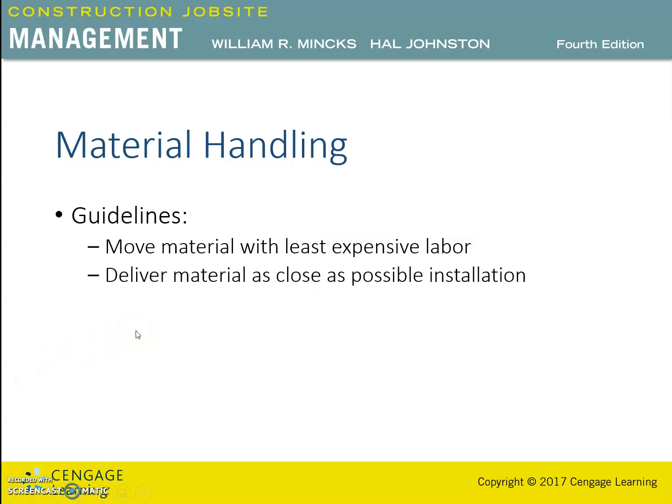A second guideline is to deliver material as close as possible to the installation place. It is logical. When possible, material should be stored near the installation location, making it ready for installation without much extra labor. This is a common practice when, for example, gypsum drywall is stocked on the job site. The drywall usually is initially distributed to the different floors or locations where installation will occur.